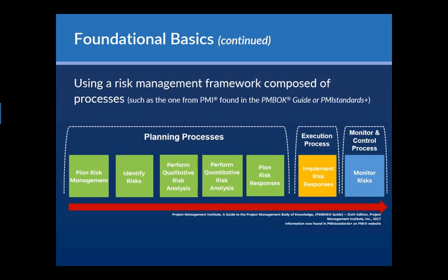So for this particular project, what are we doing and not doing in terms of risk management, and who's doing it? So all that kind of information. Identifying risk to me is one of the major processes. Literally sitting down, having brainstorming sessions, talking to your stakeholders, talking to your subject matter experts, and understanding what the risk for this project may potentially be.